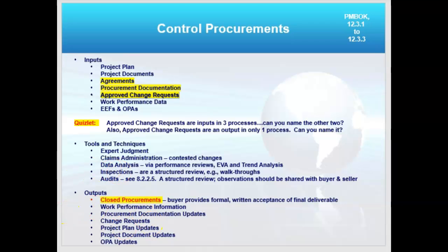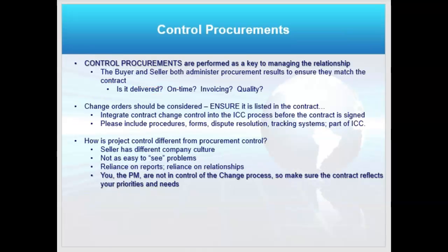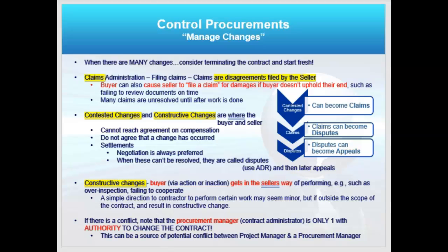And then in the end, you will close the procurement when it closes. You don't wait till the end of the phase. You don't wait till the end of the project. You close it and collect lessons learned, get feedback, that sort of thing. Some final thoughts on control procurements. You're welcome to read that yourself. It's a good slide. I just mentioned claims administration.